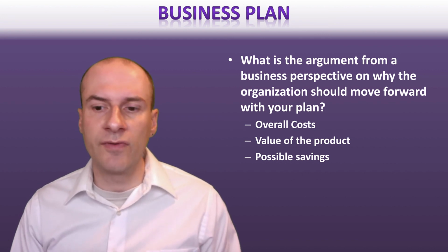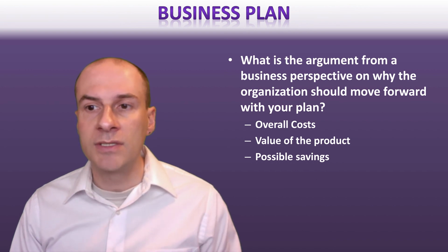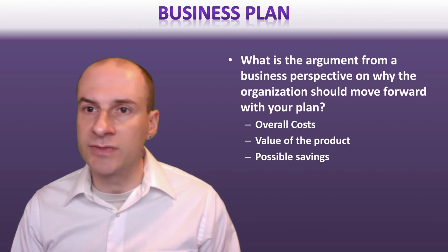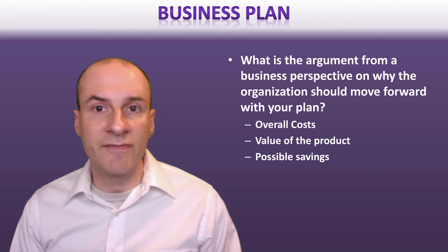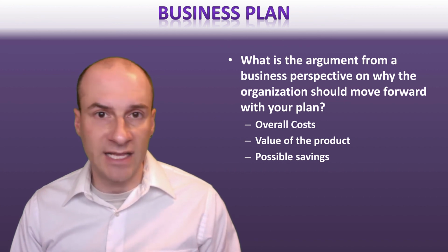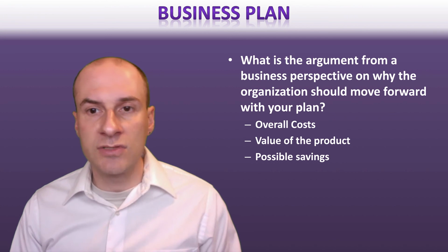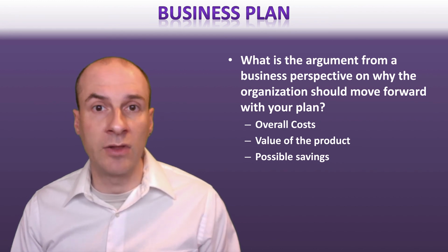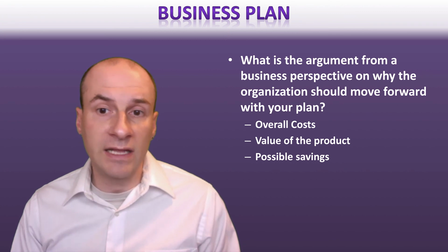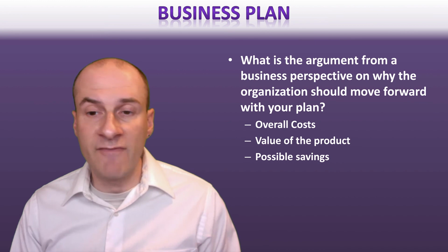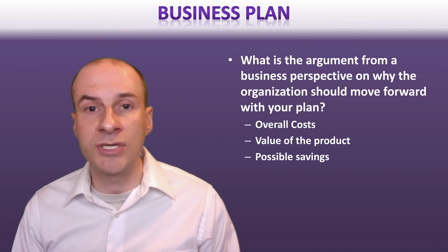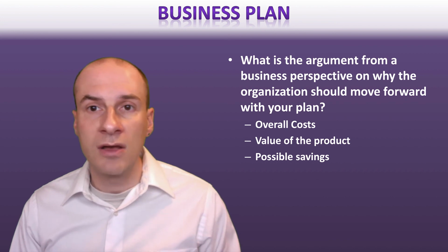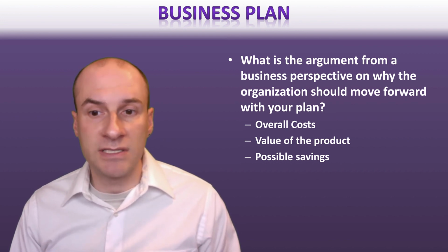Another way to argue this is sort of various types of savings that could occur. So in terms of reimbursement, in terms of long-term having less readmissions, right? Or losing less staff due to lack of satisfaction with their work, right? So there's different ways that you think about this. If you think about your project as doing something good, try and think about what the monetary benefits of that are in the long run, and try and figure out whether you can find any information out there about what that value might be. There's actually a lot of organizational data out there about, for example, the cost of replacing one nurse is actually quite expensive. I think it's around $60,000 to go out and hire a new nurse, if someone leaves because they're not satisfied, right?